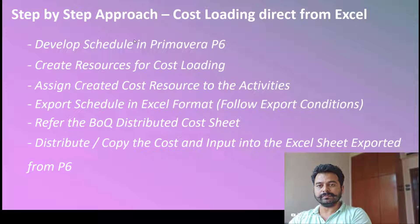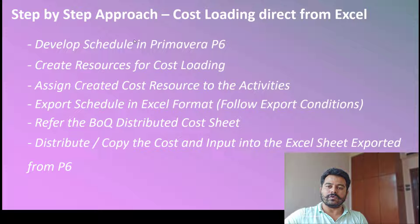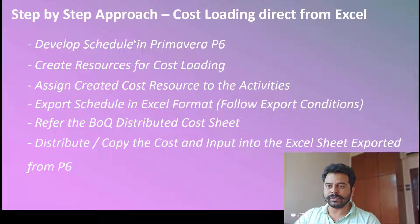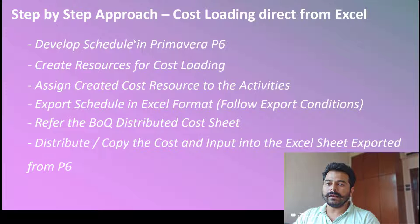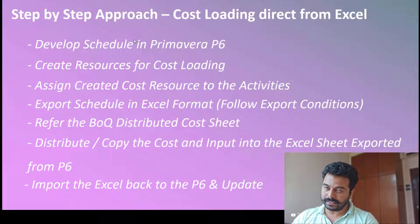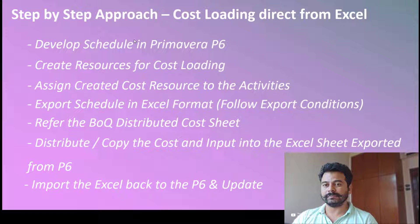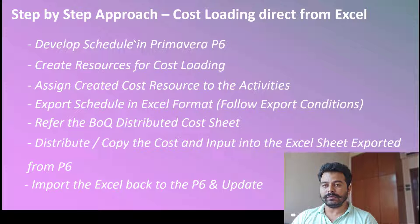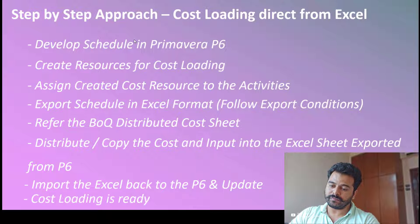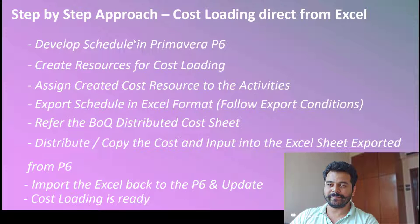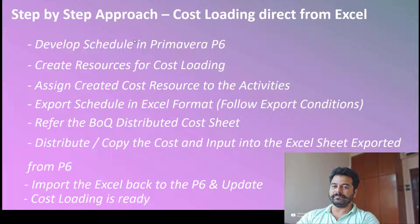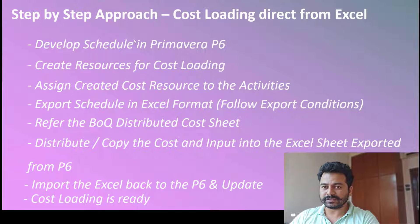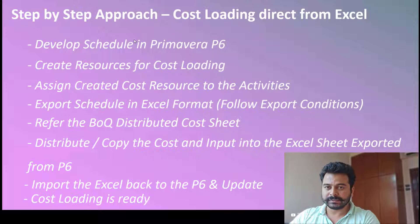Once the cost is transferred from the BOQ to the P6 Excel, I'll re-import the P6 Excel back into P6. Once I do that, I'll be putting up the condition to update, so it's a bulk update of the cost loaded program. Let us go to the P6 program now to do the step-by-step process.